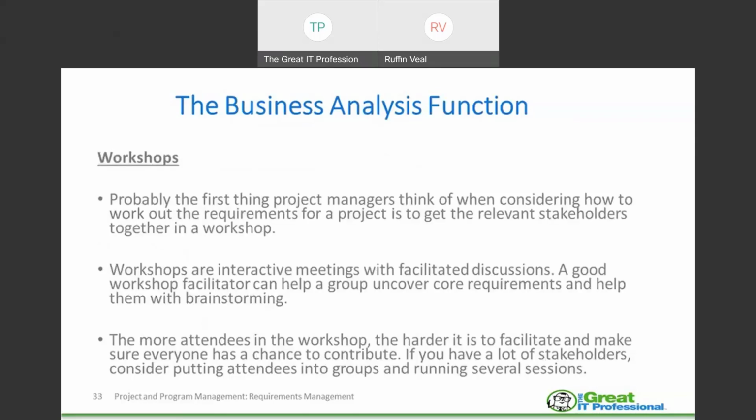We all know what workshops are, okay? The thing here that I want to point out about workshops is that when we're dealing with gathering requirements, the problem that you're going to run into is that you can't get everybody together that you need at a particular place at a particular time. Everybody's schedule is in conflict. So workshops may not be the way to do it, okay?